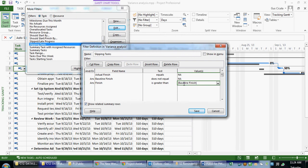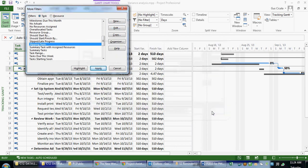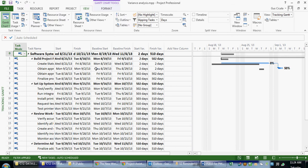Now we can filter for Slipping Tasks. So if I apply that filter, the project will tell me which tasks are starting to fall behind.